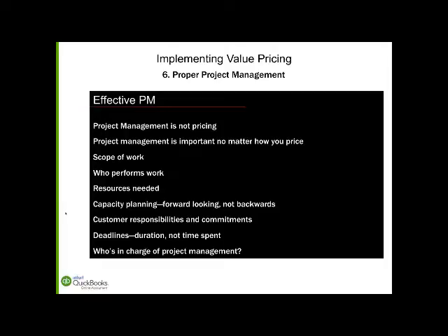Project management is important no matter how you price. Even if you bill by the hour, I think you need to have good project management, because project management basically defines scope of work. It assigns responsibility for who's going to perform the work. It outlines the resources needed. And by the way, the resources could have to come from the customer sometimes. Maybe sometimes the customer is doing a portion of the work. And keep in mind that our timesheets are only measuring our resources, and they're only doing it backwards. Project management has to look forwards. It has to do capacity planning, forward-looking, not backwards.